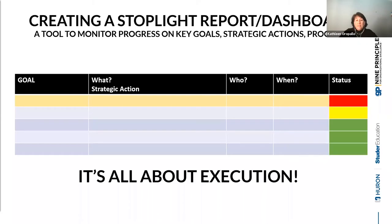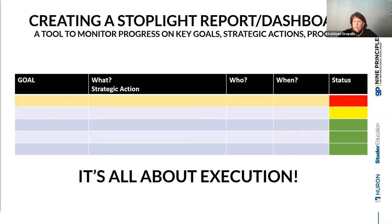It promotes individual accountability when we're executing a plan. If you look at this simple example of a stoplight, you're going to see some familiar things — a goal, an action, a who, and a when. Traditionally we have a place to check whether we've accomplished an action, but a stoplight allows us to use green, yellow, and red to look at the degree by which we're working towards an action and a goal.